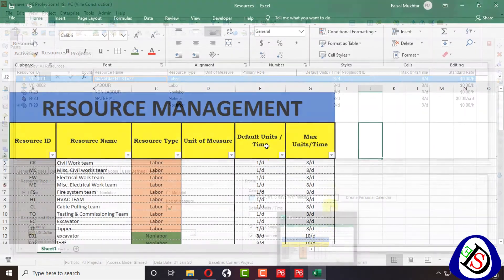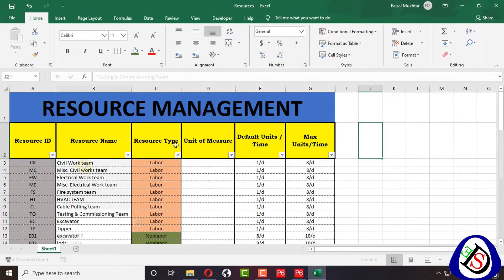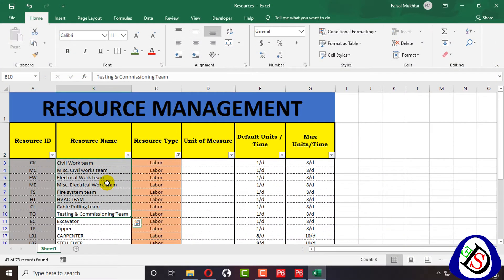I have a created sheet for the resource list: civil work team, miscellaneous civil work team, electrical work team, miscellaneous electrical work team, fire system team, HVAC team, and cable pooling team. I will add these resource names.